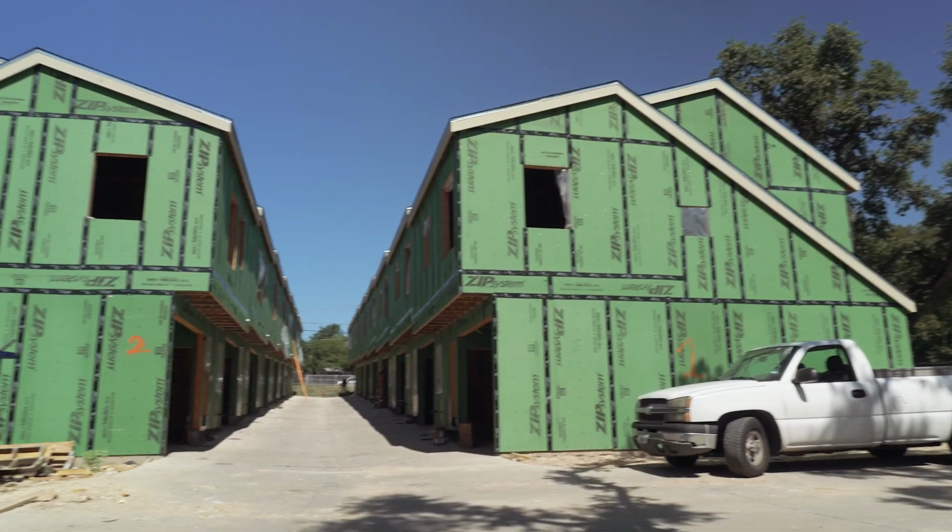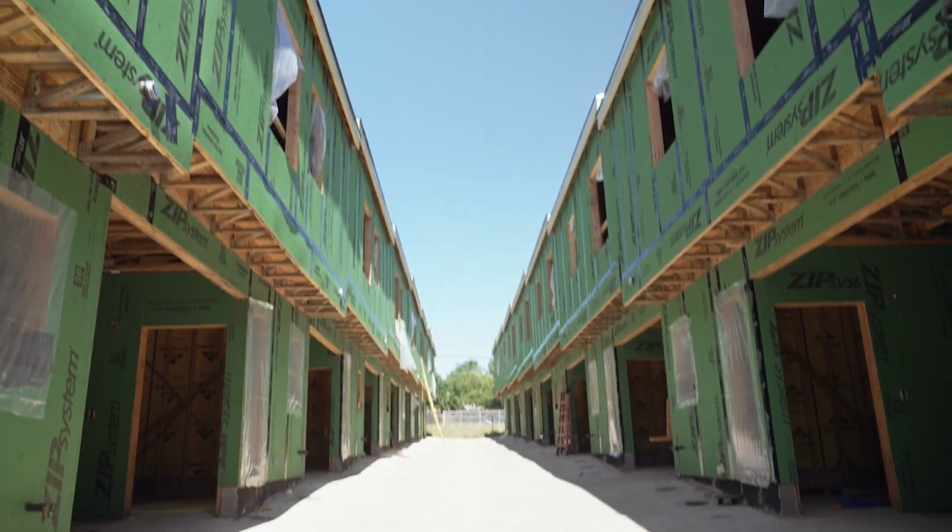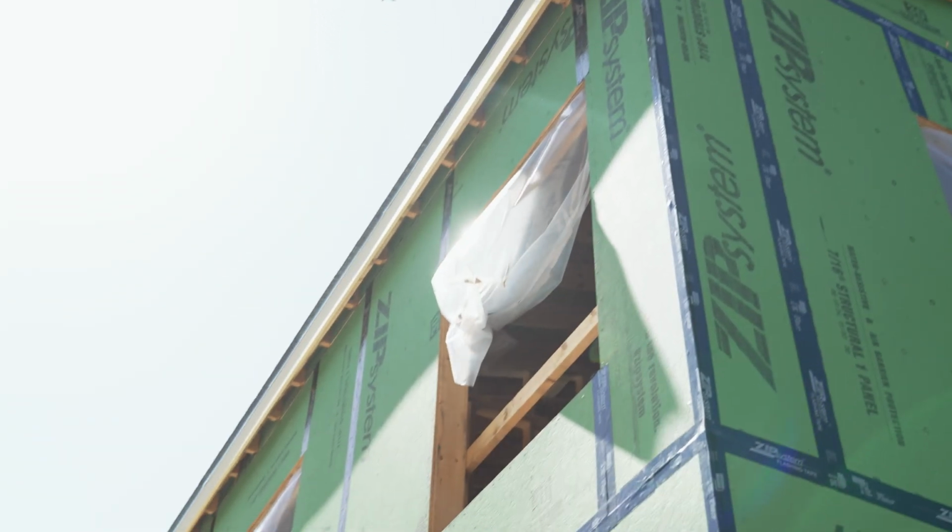We're gonna work on getting all of our interior inspections as we move from building to building. And then the next thing is to come in, clean everything up, and insulate, right? There's a waterproofing and an insulation process that we're gonna go through. As we mentioned before, waterproofing and sound barrier and our envelope is very important. So we're working with a couple different third-party consultants to make sure that, number 1, we got the right design, which I think we do. Number 2, that we install everything correctly. So as we're going along, we're bringing those consultants in, double checking our work, right? Because as you guys know, waterproofing, sound, and the building envelope is extremely important just for the longevity of the build and just for performance reasons.